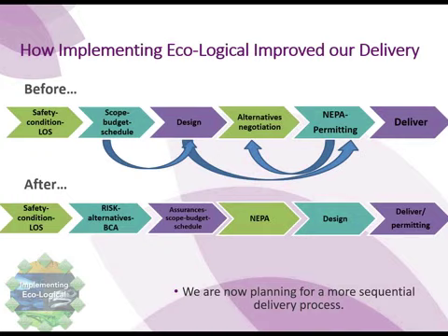Our priorities are still set based on safety, condition, and level of service, but we now do a risk alternatives analysis, benefit cost, where that risk is risk to project schedule and project budget. So if we've sat down with U.S. Fish and Wildlife and said where are your priority habitats, similar to the bins that Craig talked about, we have tiers. If something is in a really high priority tier for them, we know we have to put out our Cadillac project. If something is in a tier 3 and not a tier 1, the best habitat, then we know there's a no effect.